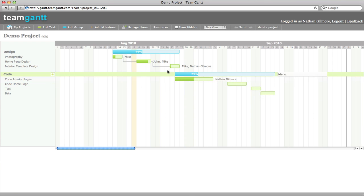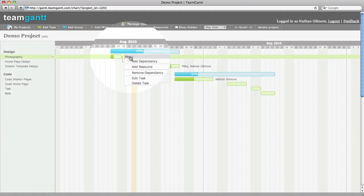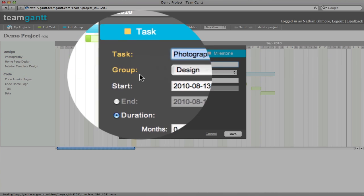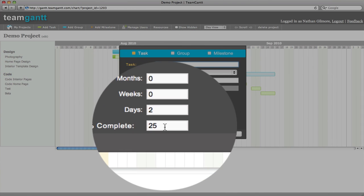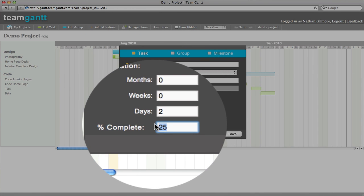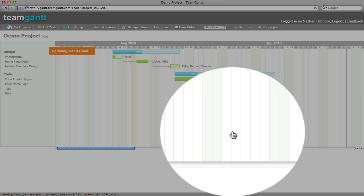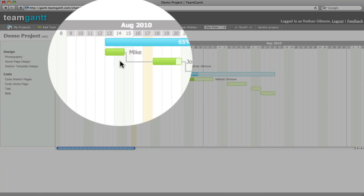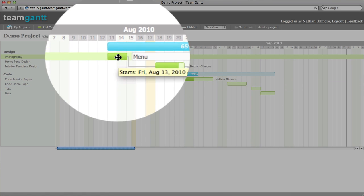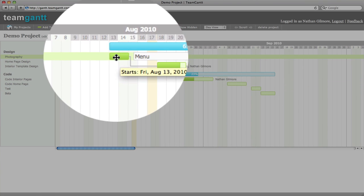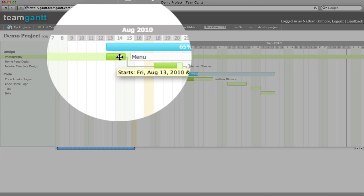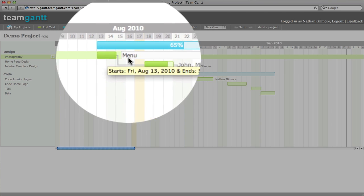You can also update the percent complete of your task. This is very helpful for tracking progress of your project. You can click menu, edit task, and update the percent complete. We'll update this to 100%. Click save, and you'll see your project has been updated, and your task is now completely full, indicating it is 100% complete.